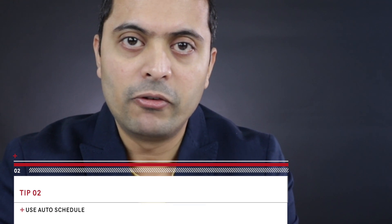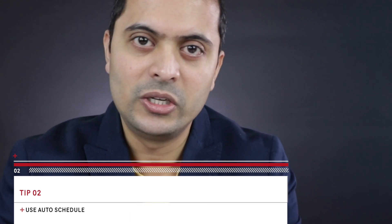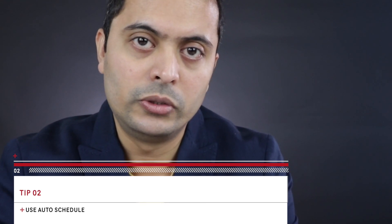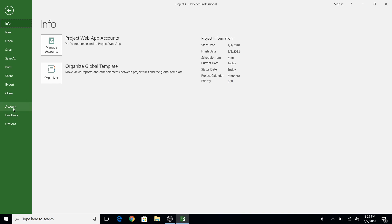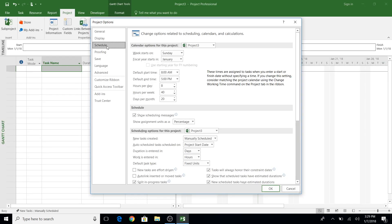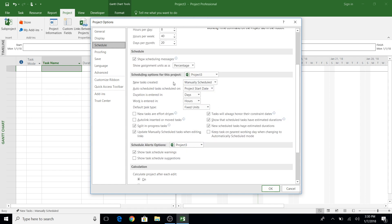Next, by default MS Project uses manual scheduling, which means it uses the date that you pick for each task and it doesn't automatically move as you change tasks or things get delayed. So don't use manual schedule — use auto schedule. You can do that by going to the File menu, under Options, scroll down to Schedule, and there you have the option for all new tasks to be manual or automatic. Always pick auto schedule.